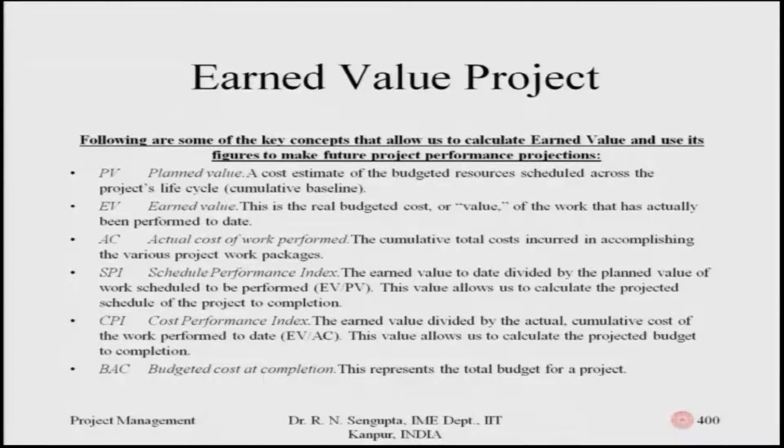The earned value means this is the real budgeted cost or value of the work that has actually been performed till date or till a certain time. So, say for example, you had planned to utilize 100 crores till, say, the end of 3 months, and if you see the earned value with respect to the completion of the job is not 100 crores, but is more than 100 crores, say for example 125 crores, then you will take a decision whether those extra 25 crores which you have utilized actually were out of control, or the overall effect from the environment was such that you had to spend them. In case it was not, then obviously it will mean that you have made some wrong judgment based on the calculations which were given to you. So, it was not realistic. So, you will again go back to the drawing board, try to analyze the problem and then proceed.